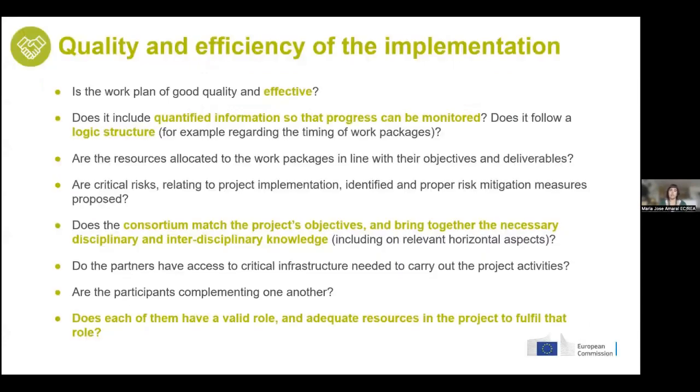In terms of implementation, we already talked about the work plan, how it needs to be of good quality and effective, how you can quantify information so that it can be monitored and assessed by outsiders. So which deliverables are you going to do? Which milestones are you going to plan to make sure that you are progressing? How the logical structure from one task to another task to the next work package is organized and makes sense. In terms of the resources, also that you have enough resources in each task, in each work package to deliver on their objectives and on the deliverables that you planned.